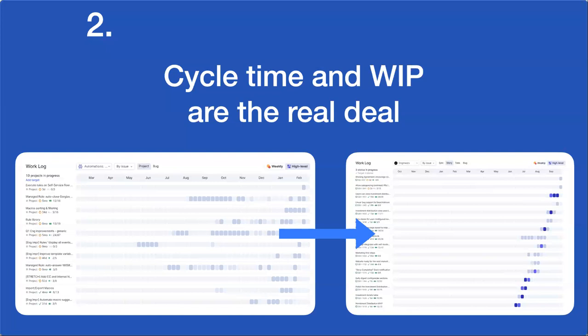So what we think most organizations really need to take from agile practices and lean is starting by limiting the number of things you're trying to do, and that will lead to a bunch of good things. Many developers don't necessarily understand how deep they are in these situations before they see it.